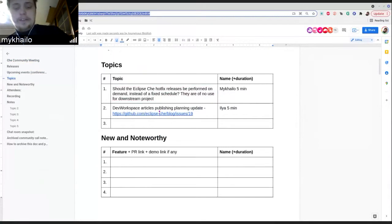As the schedule goes, we usually do one major release at the end of the sprint, which is one week, and then in the rest of the two weeks we do one bug fix release as planned. So next week is the .1 release, the week after that is .2. We initially did this approach to make these scheduled regular bug fix releases to test our release framework, so to speak. Now that it works more or less the same without changes and is as automated as much as possible,